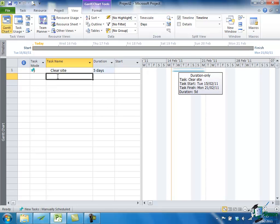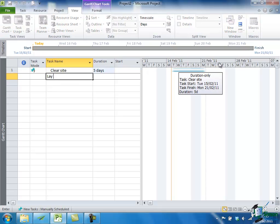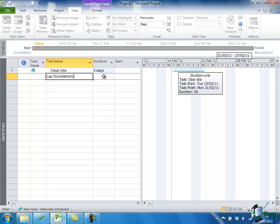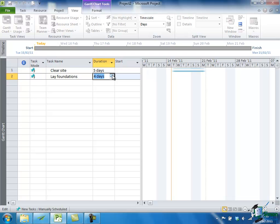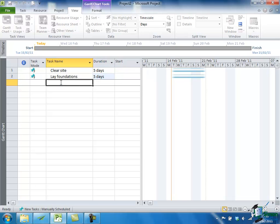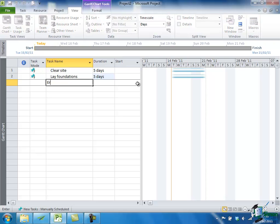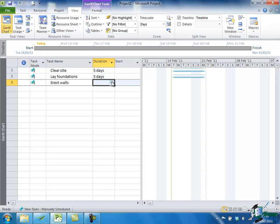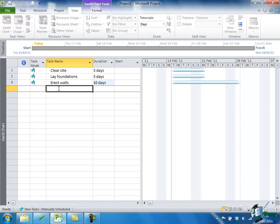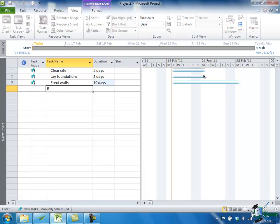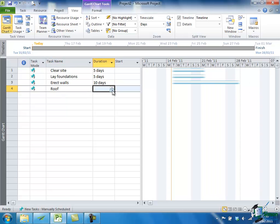Now my next task is to lay the foundations. Depending on your country, you might call these footings or something else, but we'll say foundations. Most people would understand that statement, and I'm going to allow a week for that as well. Then I go to my next task, which is to erect the walls. I think I might allow two weeks for that. Then I'm going to say put on the roof, and I'm going to allow two weeks for that as well.